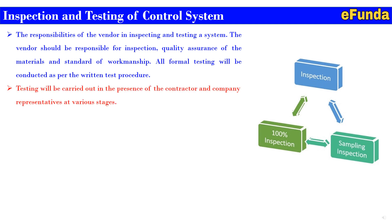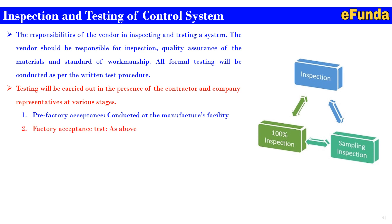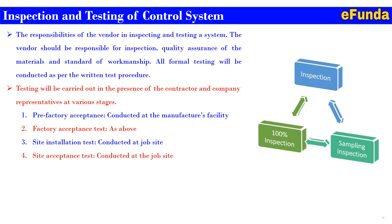Testing will be carried out in the presence of the contractor and company representative at various stages. First: pre-factory acceptance conducted at the manufacturer's facility. Second: factory acceptance test as mentioned above. Third: site installation test conducted at the job site. Fourth: site acceptance test conducted at the job site. In today's video, we will cover the first part — pre-factory and factory acceptance test — in detail.